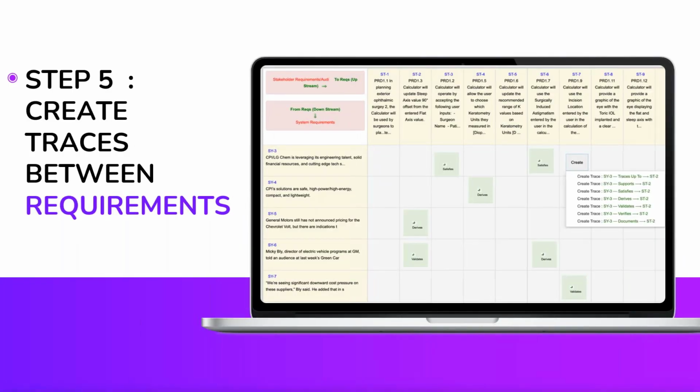So the next step we had was traceability, right? So you need to have an easy to use tool that lets you say, okay, I have requirements in a folder that are owned by a business analyst. I have requirements in another folder that are owned by the engineering manager or owned by the test analyst team. I want to be able to connect them in an easy to use system. So we call that a trace matrix. You could use that to build those daisy chains.